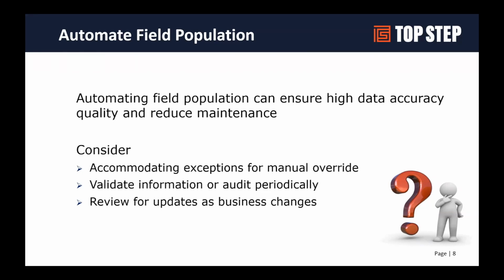Some of the other examples are like project health. A lot of customers are tracking, are we red, yellow, green on our project? Well, you can manually set those and have the PMs updating those. You could also have those automatically set based on defined values. How are we on our budget? How are we on our time capturing? How are we on other factors that influence the health of the project? And then we could automate the setting of that field so that it's not set at green and just set forever at green. We can actually have a value that meets business rules, that gives us real information of which projects we may need to dig into.